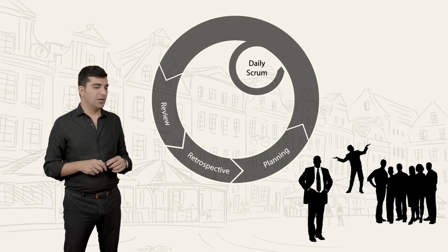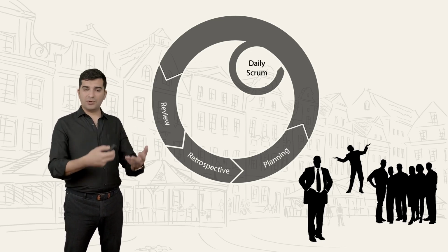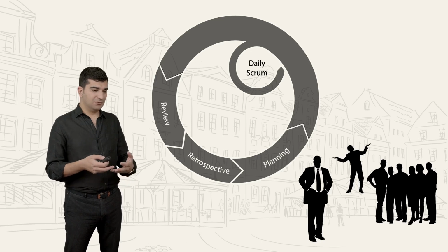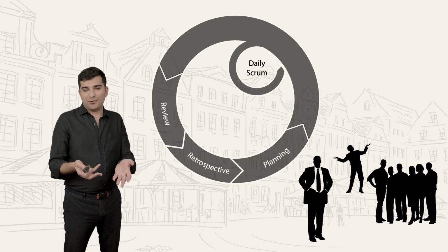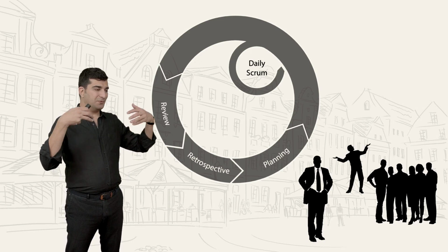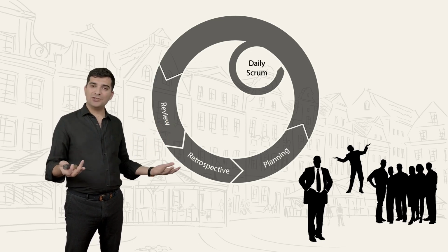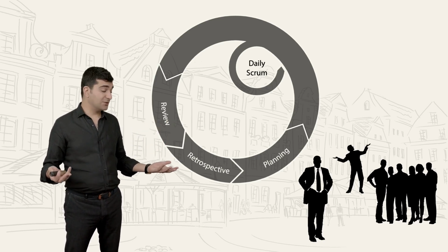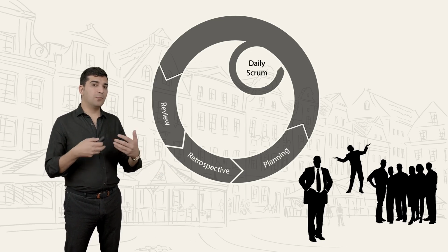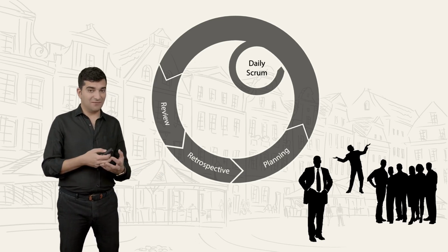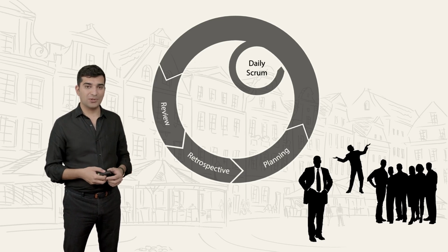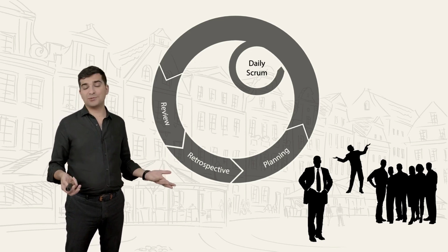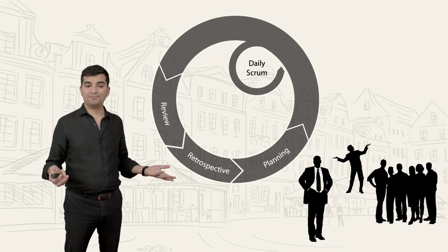You remember, in the beginning of each sprint, we create a sprint backlog, and that's what we use as the plan for our sprint. So we are free to make changes to our product backlog. That's a great thing. Instead of waiting for a specific event to refine the product backlog, you will do it as soon as possible.